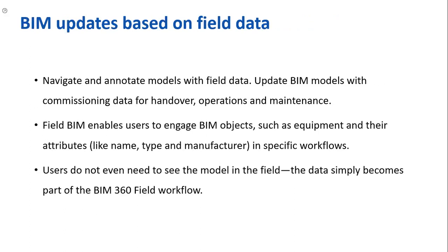The next one is BIM updates based on field data. Navigate and annotate models with field data. Update BIM models with commissioning data for handover, operation, and maintenance. Field BIM enables users to engage BIM objects such as equipment and their attributes like name, type, and manufacturer in specific workflows. Then users do not even need to see the model in the field. The data simply becomes part of the BIM 360 workflow.